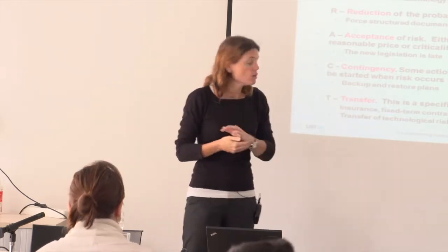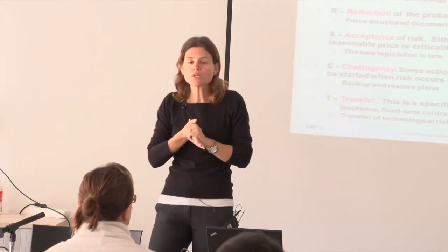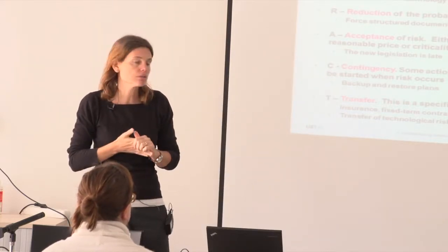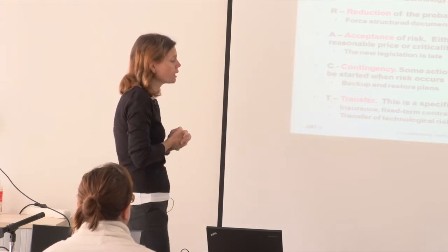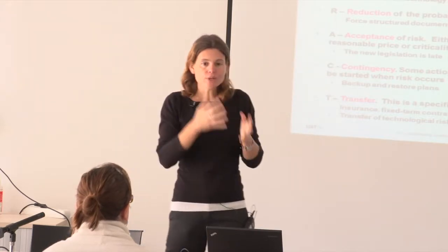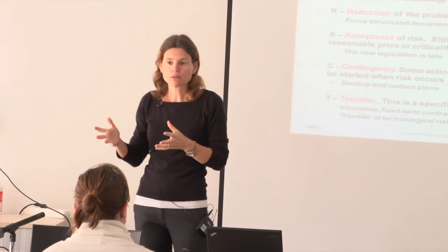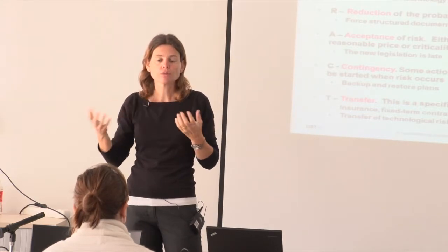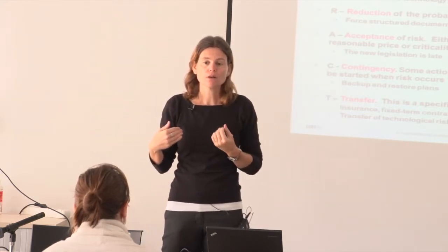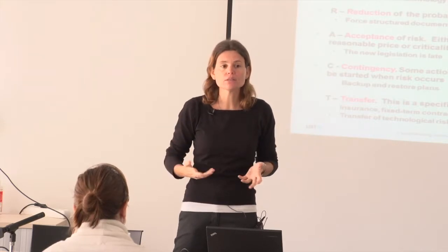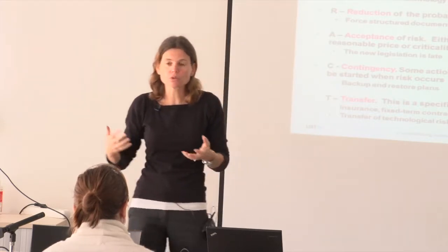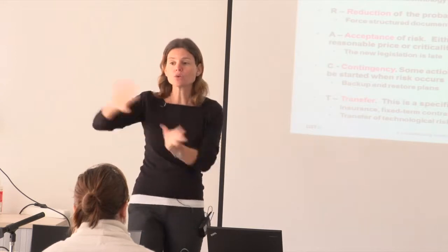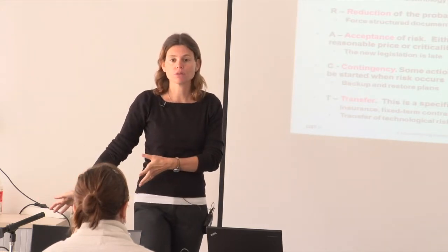Transfer is a special way of reducing the risks. It's saying, if the risk is there and if there are some impacts, I'm not going to get the impacts directly. My company is not going to have to support these impacts. I will transfer these to somebody else.